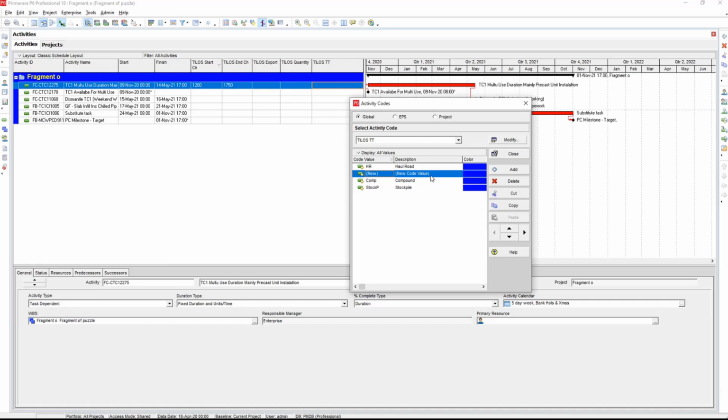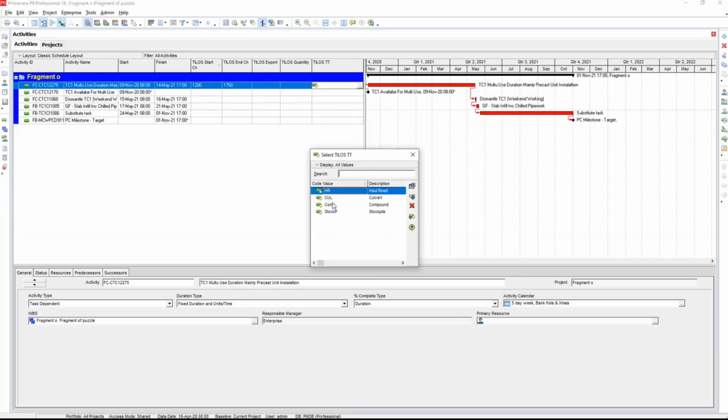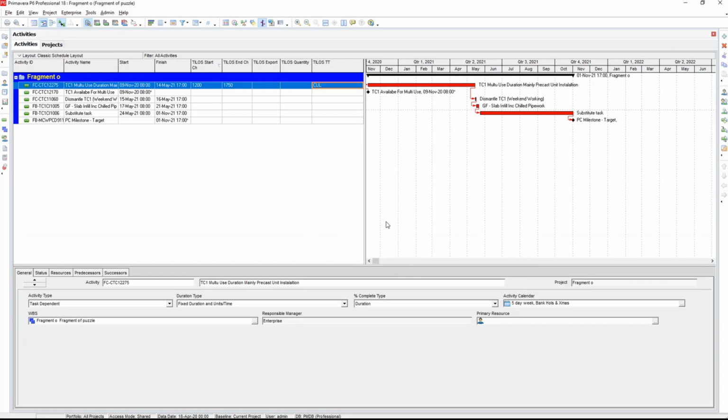So in there we've got one called, I'm not familiar with driving P6, so this is, and because P6 has got these restrictions about the length of the name, so you've got unlimited description, but a pretty severely limited value field, and it's the value field that will be exchanged in the XML file. So we want to be able to choose a code activity assignment.